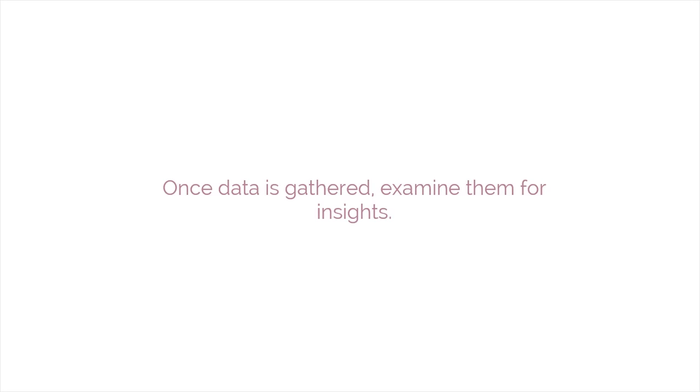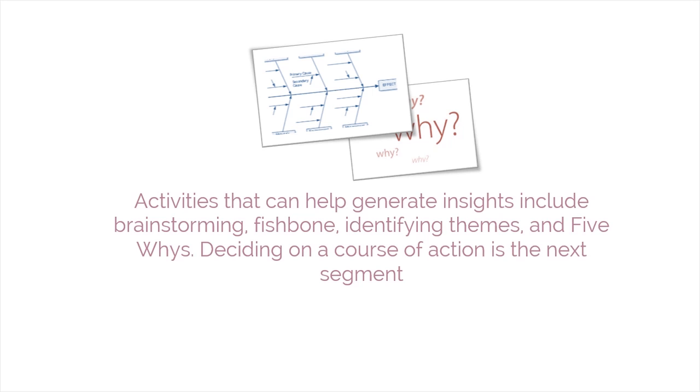The third segment is generating insights. Once the data is gathered, examine them for insights. Activities that can help us generate insights include brainstorming, fishbone, identifying themes, and 5 whys.